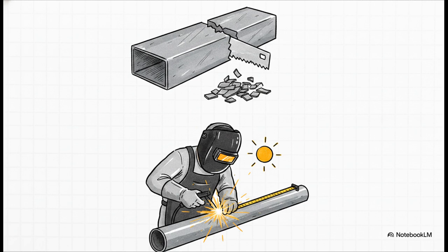If you ignore that waste factor, you're going to underbid and bleed money. It's the same deal with power plant pipelines. Labor isn't just some random hourly guess. You have to figure out the total amount of work and divide it by the welding crew's daily productivity. Like, exactly how many linear meters can they realistically weld in a single day? Real-world estimation is all about sweating these granular details.